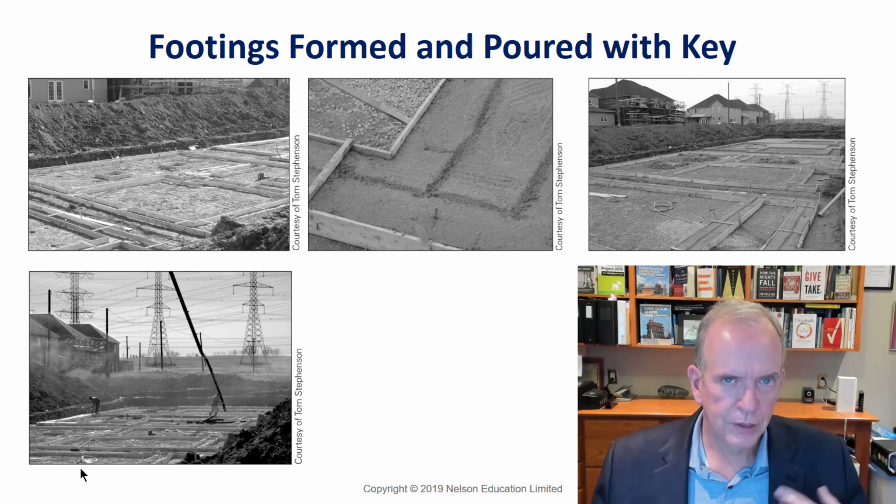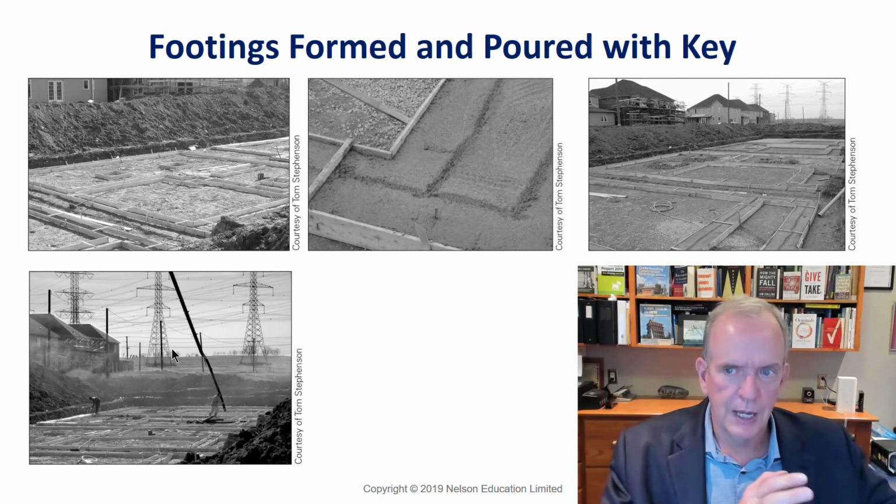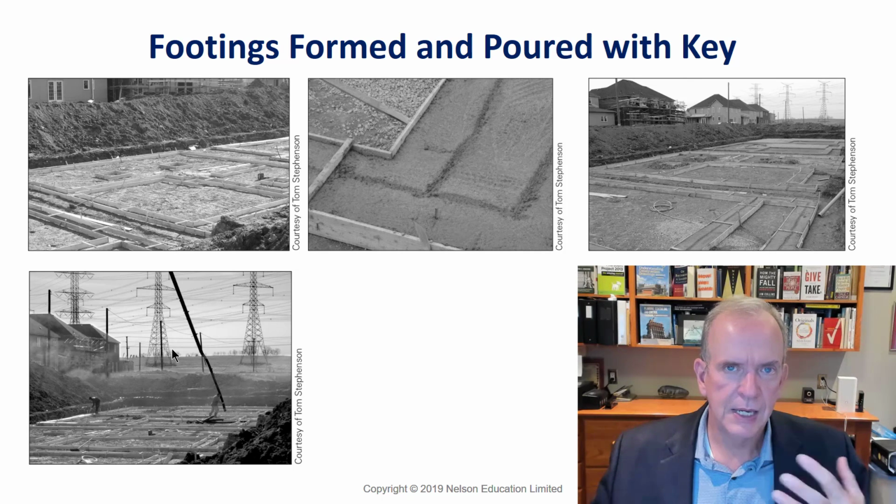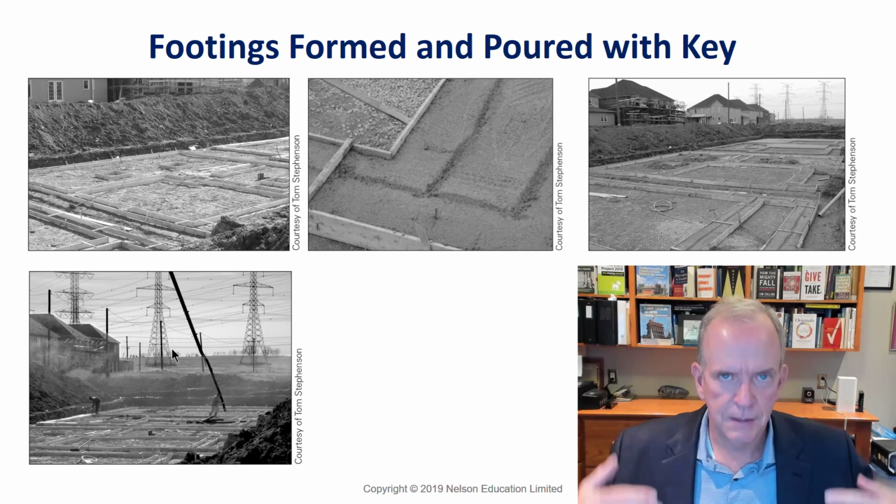A lot more difficult to line up the resources, the trades, and keep them there to do what they need to do. Production, you can get them, they finish one row, they go to the next, they go to the next. If I'm a subcontractor, I know how many plumbers I can keep on that site for the next 6 months. It makes it very easy to schedule the work.